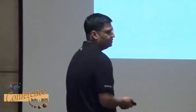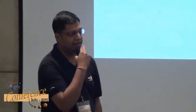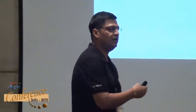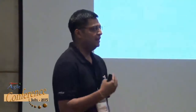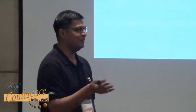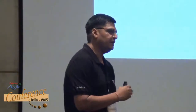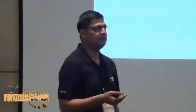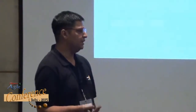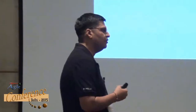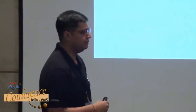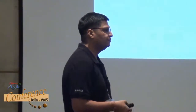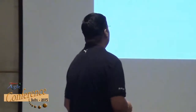Identify and understand supporters, neutrals, and non-supporters — you will find all kinds of people in the organization. You can't have a big-bang approach. Take baby steps. Lean towards people who want to try it out and give them an opportunity. The neutrals will see where the wave is going and incline accordingly, slowly coming to your side. The non-supporters probably have a genuine reason — maybe they have commitments or deliveries, they're worried whether changing the gear will let them make their numbers. One-on-ones may help more than group explanations — find out their apprehension and what the pain point is. Avoid big bang and take baby steps.